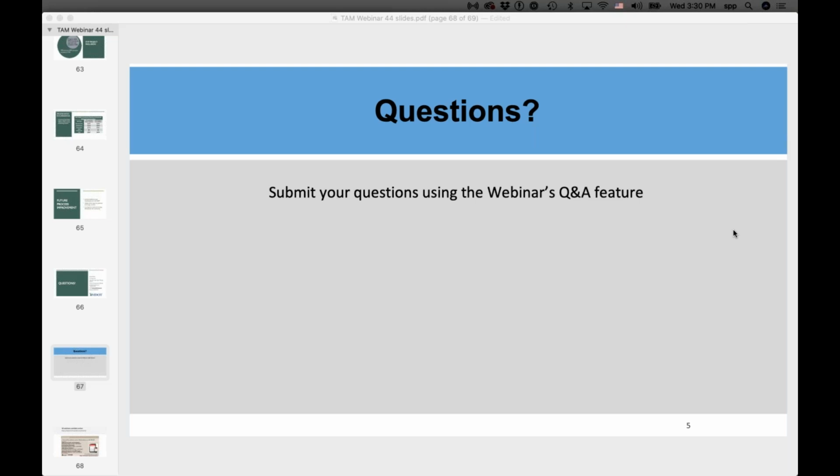This is Dave Gardner. I can start that. I had talked about our pavement management system, and the pavement management system utilizes the PCR data that's collected as part of the asset management program. Once the optimization is done utilizing the pavement management system, those projects are made available to the districts, which can choose from them as part of their selections into their annual work plans.